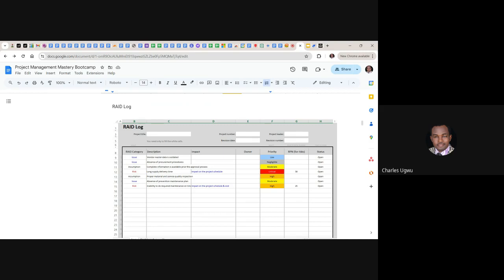And you can see even a dependency can become a risk. If activity B is waiting for activity A to finish before it can start, and activity A is meant to happen in 2 hours, and then once it finishes, activity B will start and finish in 2 hours, so the 2 activities will take 4 hours.